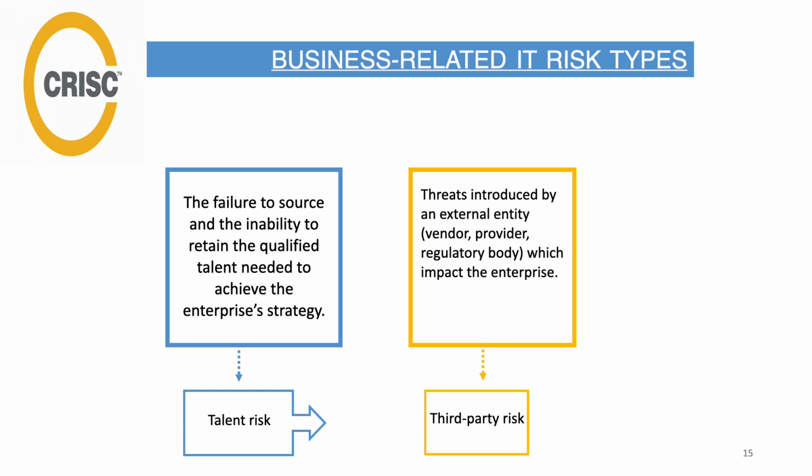Transferring the risk to a third party also includes outsourcing certain functions and services to the third party. That is a standard risk treatment method. The organization, for example, can reduce the risk of accounting and budget errors with a small untrained staff by outsourcing its accounting function to a third-party accounting firm.